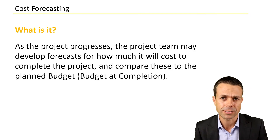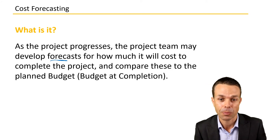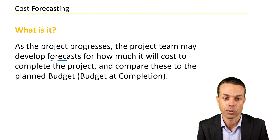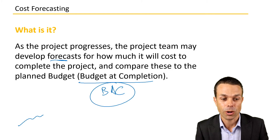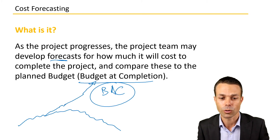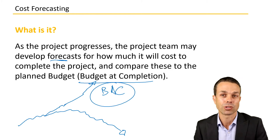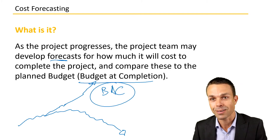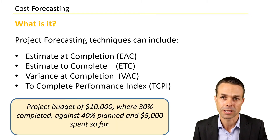So what is cost forecasting? As the project progresses, the project team may need to develop forecasts for how much it will cost to complete the project and compare these to the planned budget — the budget at completion, the BAC. Your project as it's going along may be on track, off track, costs may be blowing out, or the value you're delivering is changing. Sometimes things just don't go to plan, so we have to figure out how much it's going to cost us to finish all of the remaining work. That's where cost forecasting comes into play.